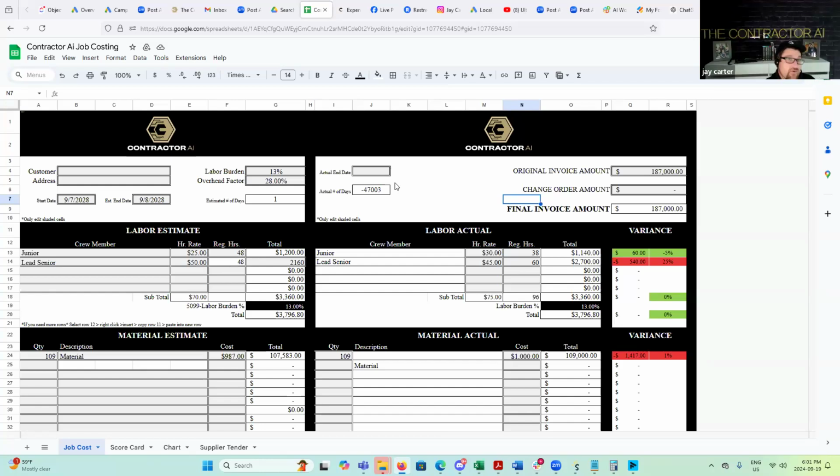Yeah, so this can all be done real time. Again, if you've got an iPad, you can use a Google Sheet as you're going. If you wanted to make this your daily checklist. Again, how many hours do I have left? You're basically telling yourself where you're at. So if I've budgeted for 48, and I'm coming in, I've got 26, and I'm only 50% done that job.